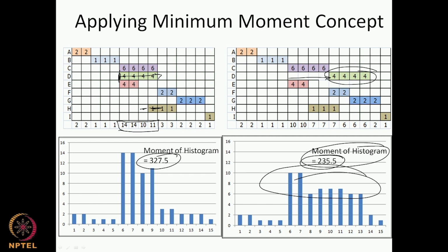That will certainly give you an answer, but the computational effort of calculating for 50 alternatives might be too high. Of course, 50 alternatives is not high in this case, but if you had several 100 activities with several different days of float, it could blow up into a very large figure which is not easily computable.